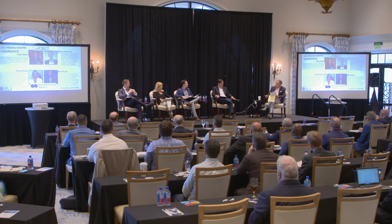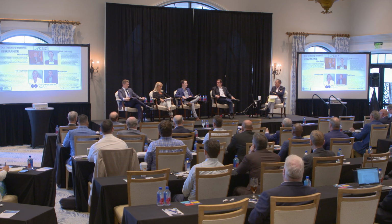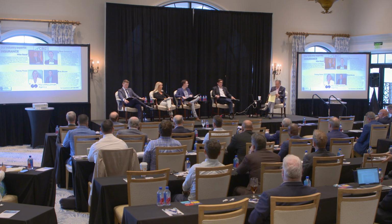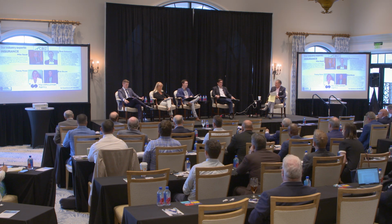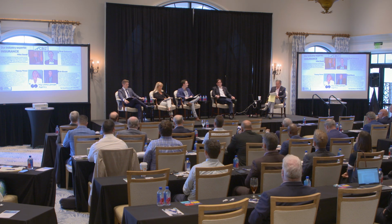So, Nick, where do you usually see the biggest misses there in keeping you well informed? Is it that we learn you're putting a shovel in the ground on the new project and now we learn about it, or is it something else? That really is the big one. We had a situation where the club had already signed their contract prior to telling us about the project. And so then we really had to go as far as meet with the contractor. Mike spoke with them directly to explain why the contractual language the club agreed to was not available in the insurance market. And the contractor agreed to revise the terms from that. But that's a big one, is giving us the timing to look at your contract and inform you of what's going to be there.